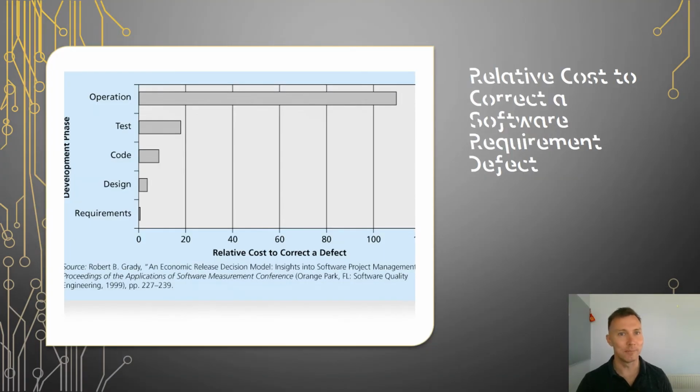And this is why. Okay, it's a lousy diagram, but the point is clear. It's much cheaper to fix problems at the requirement stage than once you've put the project into operation. In fact, any time is a lot cheaper than doing it during operation. But if you have a tight budget, get your requirements right.